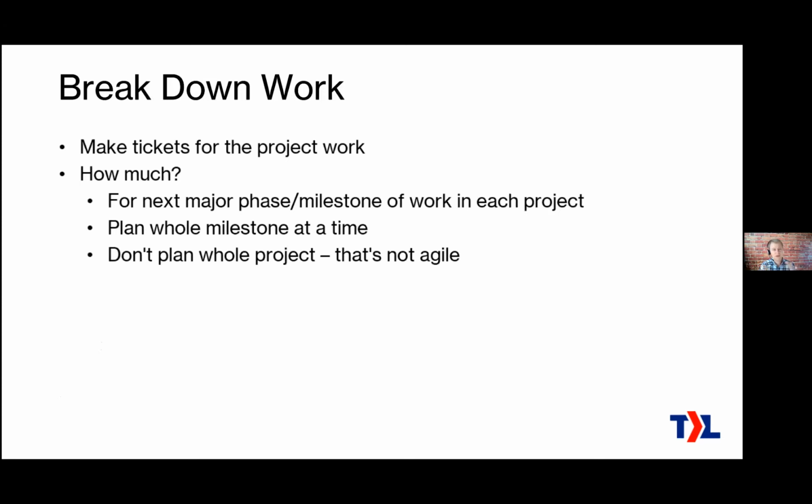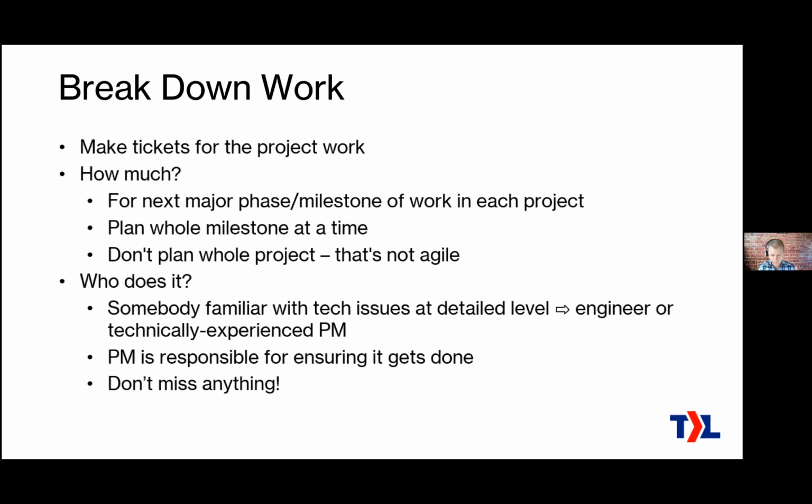And maybe that is the whole project, maybe it's a smaller project and there's only one milestone. Then you are going to plan the whole project. But if it's a larger project with multiple milestones, don't worry about all of the later milestones. Just do the first. I'm talking about detailed planning here. Just do it one milestone at a time. And the reason is, okay, so who does it?